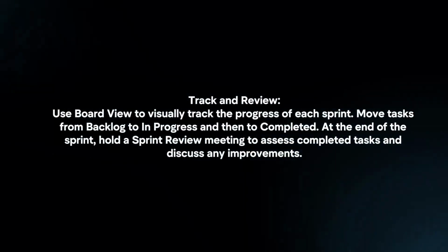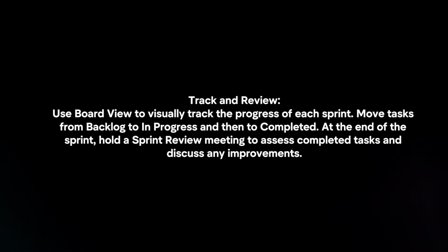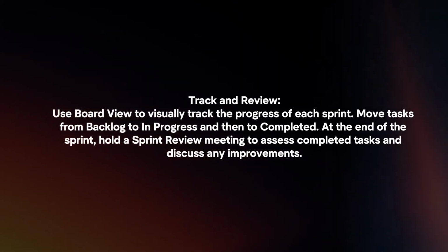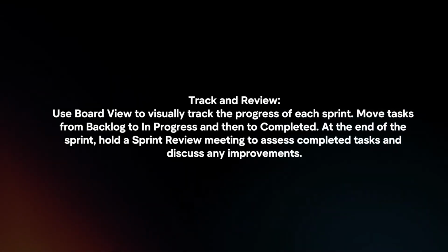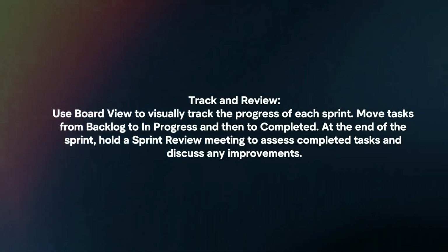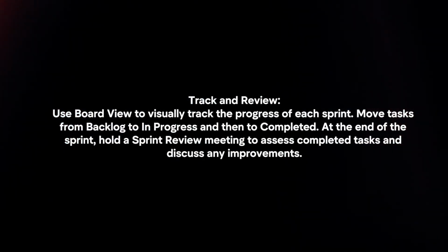Track and review. Use Board View to visually track the progress of each sprint. Move tasks from backlog to in progress and then to completed. At the end of the sprint, hold a sprint review meeting to assess completed tasks and discuss any improvements.